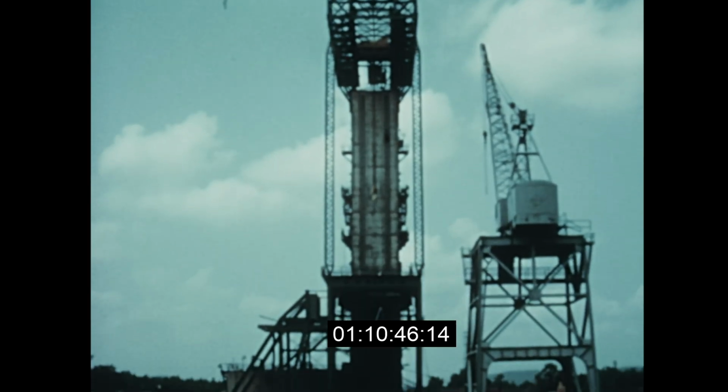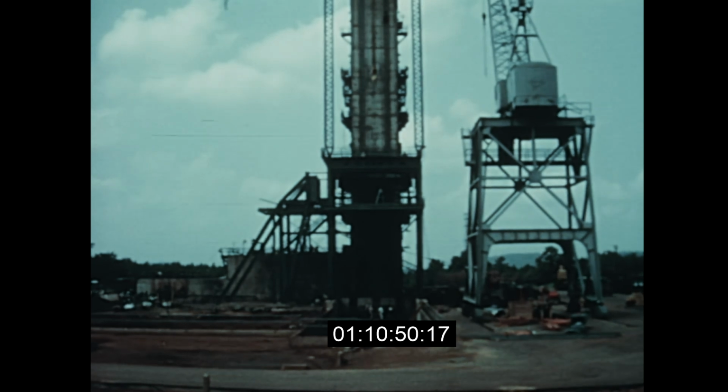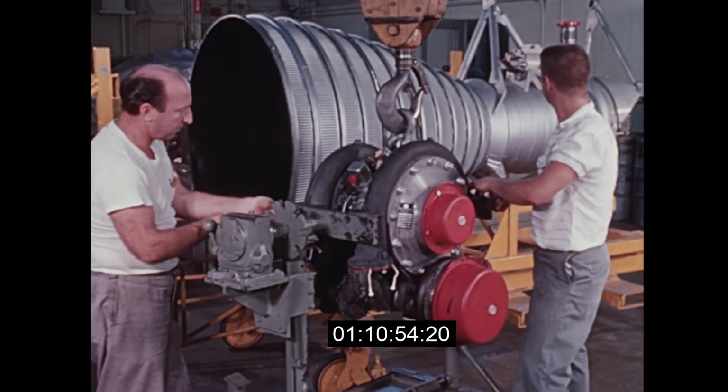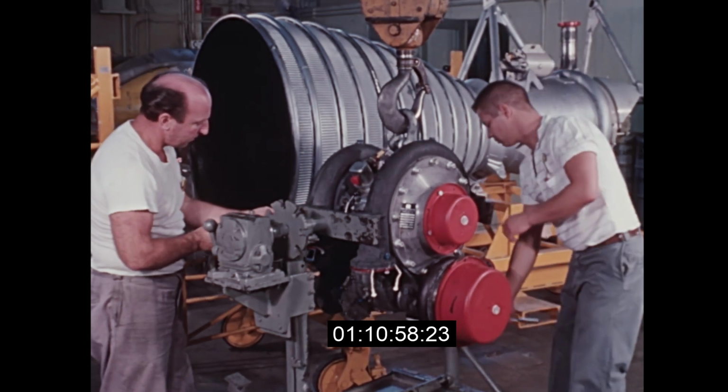When the evaluation program has been completed, 8 engines will be clustered and test fired on Static Test Tower East, the gigantic captive missile test stand now being enlarged to accommodate the Saturn cluster. As of August 1st, 1959, all schedules and objectives of first phase development show a favorable status.